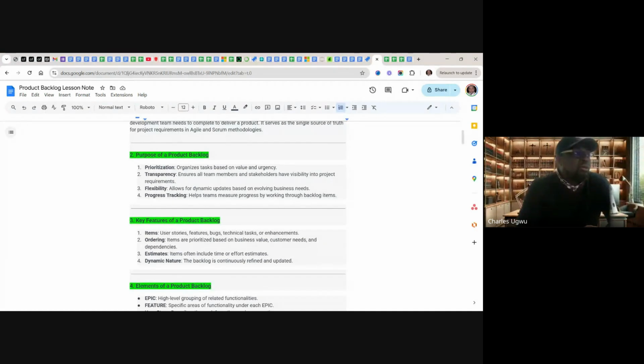It's not allowed. If the product owner feels that an item becomes important and the item is at the bottom of the backlog, they go down and bring it up. That's what we mean by refinement, grooming. You keep on refining it. The ones that are no longer important, you take down. The ones that are more important, you bring up.